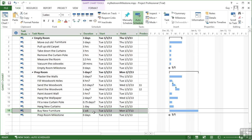So by marking a task as a milestone in task information, it does not remove the duration — it places the marker on the Gantt chart at the end of that duration but doesn't display the progress bar. That covers estimated tasks and milestones.